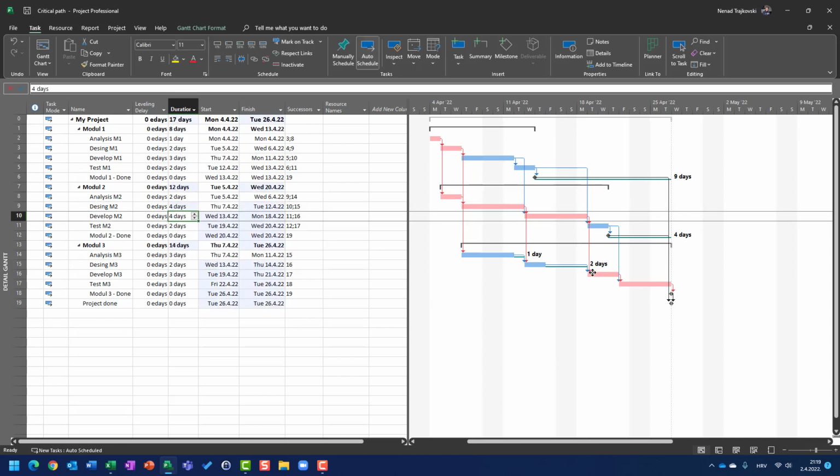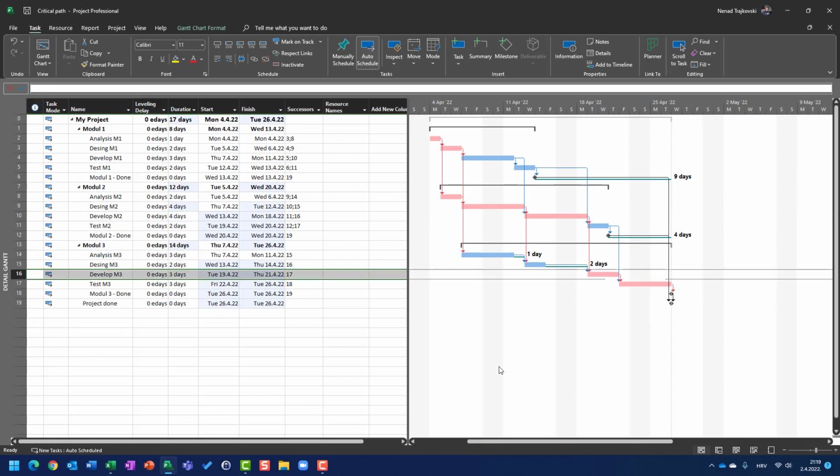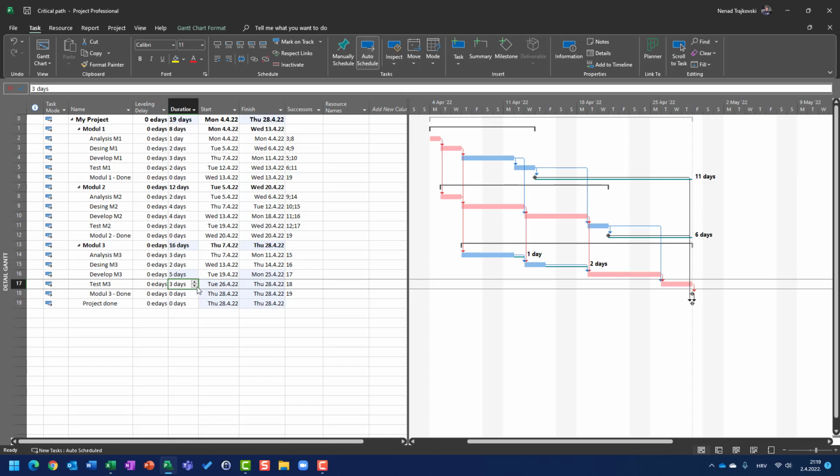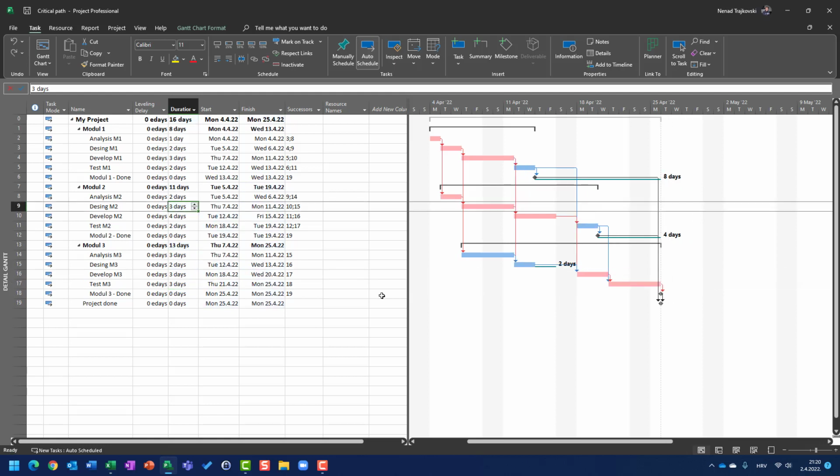So now, let me give you another example. Here, develop module 3. Let me put it that it is 5 days. Now, here we have Tuesday, 26th, but now it's Thursday, 28th, because this task is 2 days longer. But what will happen? Now I will undo that. What are these 8 days, 4 days, and 2 days? Those lines and those numbers are called slack.